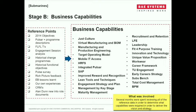So now we know why we need to change and we've got buy-in — that's a great start. We've got a vision and strategy of what we want it to look like. The key question, going back to my boiling water example, is: I need the ability to boil water, but what is my capability? Is that a kettle, is it a pan? There are many different options, but understanding what those capabilities are in order to deliver that. We used reference points — previous objectives, previous change frameworks, previous improvement initiatives done potentially in isolation. We finished with 27 capabilities. At the height it was 35 and at its low point was 21 as we defined what the scope was and understood where the capabilities would fit in. So we've now got 27 capabilities, or projects as they will become, to deliver that capability.